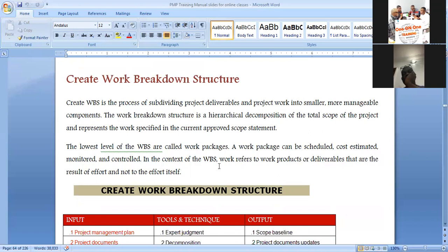They talked about handling the community security issues, mobilizing the equipment, and carrying out a leak test. They asked us in number 4 to carry out cleaning of the pipeline. They said after that, we should blow dry the pipeline using a compressor. And having done that, we should move on to the next phase and carry out nitrogen purging.